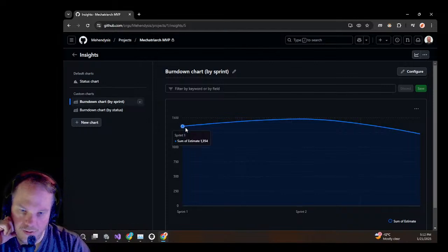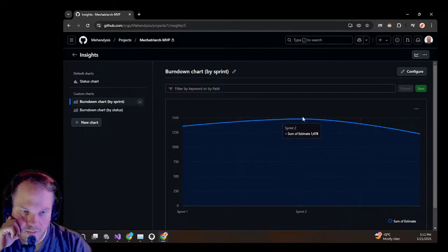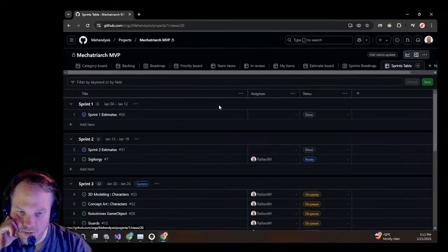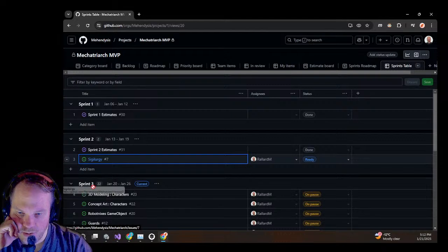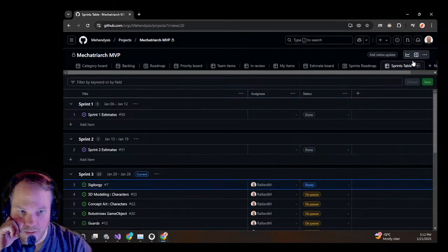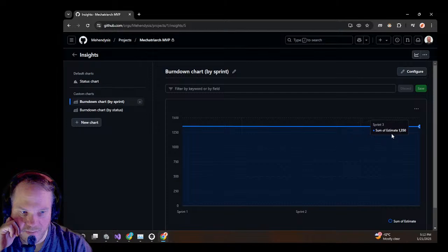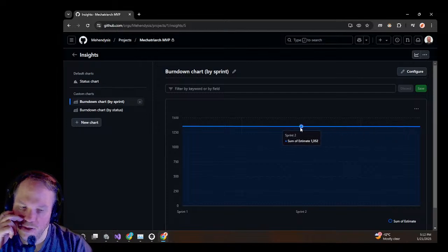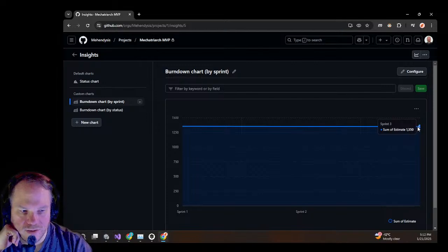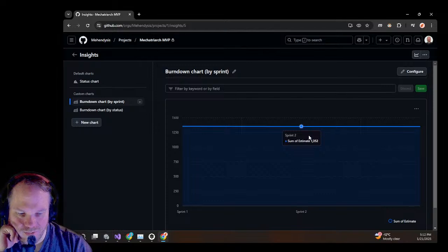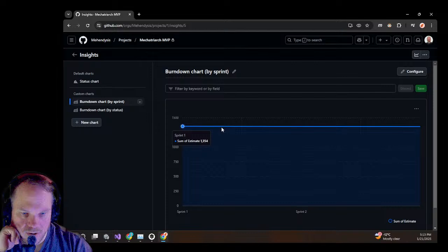It seems weird. Sprint 1, sprint 2. I think I forgot some. Oh, it's this one. Okay, let's see. So what's the burn down chart? It could happen that you are at sprint 2 or 3, and then you notice that you are missing some task, and your burn down chart will go up instead of down. It can happen. You don't need to worry. It only serves for you to know when your project is going too slow.